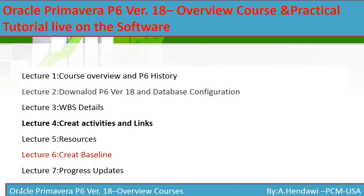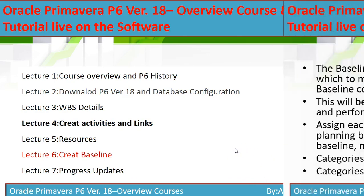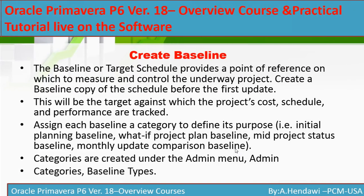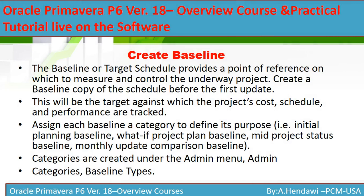This is very important because your baseline is a sign of what you agreed with your client. It's your reference of measurement and you would like to measure any differences, any delays compared to the baseline to know if you are ahead of schedule or behind schedule. The baseline is your target that provides a point of reference, and you will use this copy to measure any deviations in schedule and cost.